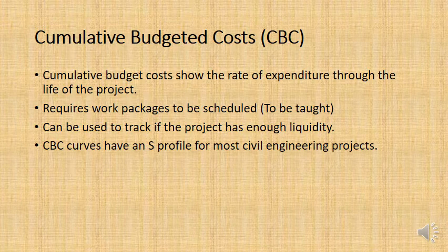Now, they could maybe go back to the sponsor and negotiate and say, actually, it would be better if you pay us $25,000 of the profit after 5 weeks and the other $25,000 after 10 weeks, or you could pay us $5,000 in profit every week, and so forth. But actually, with the status quo, it's not feasible. There's no liquidity. The project will go bankrupt before it can be completed. Hopefully I can show that to you in the next example.